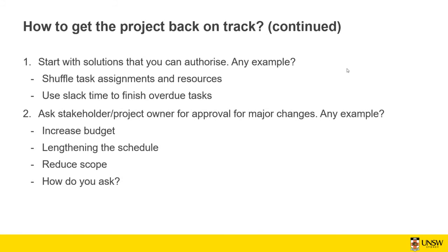When you ask them for more money, you need to say, this money is going to be spent on this and that, and this is the budget. If you do that, then we can finish on time. Or otherwise, you can say that this has been delayed by that much. This is our earned value analysis, and we are going to finish 10 days, 1 month, or 6 months later. And that's the reason, because we didn't get the material on time, etc.